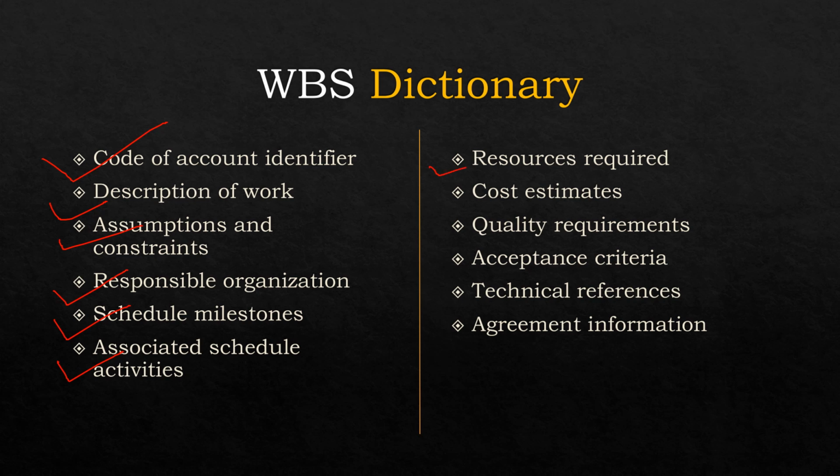What are the resources required, or how many resources are required for it? Cost estimates for this work package. What are the different quality requirements? What are the different acceptance criteria? Any technical references in order to accomplish this task. Any agreement information, if the work is being done with any vendor or any supplier, right?